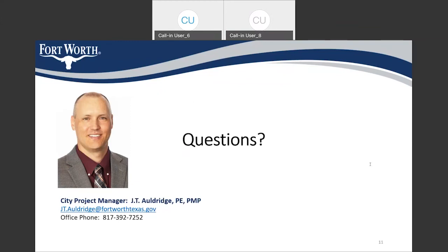I see another question. Can you repeat when it will start and how long it will take to finish? Yes, we are planning to start work in December, early December, so before Christmas, and we anticipate completing by April of 2021. So it should take about 4 to 5 months. Next question: is this being paid for by taxpayers? Yes, this project is being funded by the 2018 bond program. So the city's 2018 bond funding is funding this project.